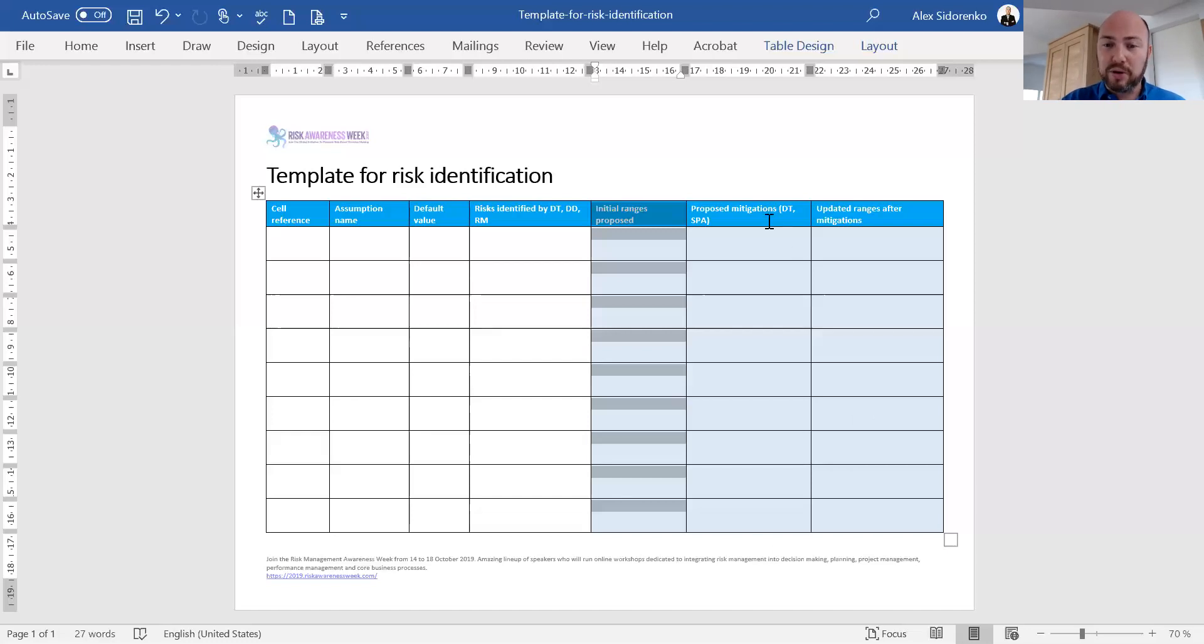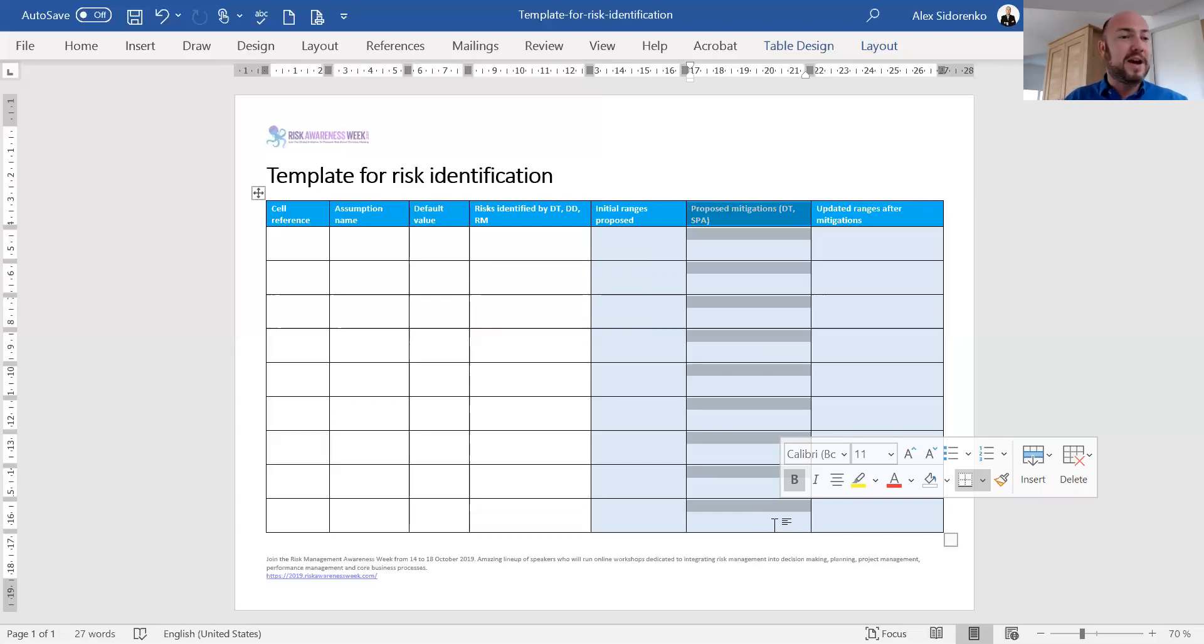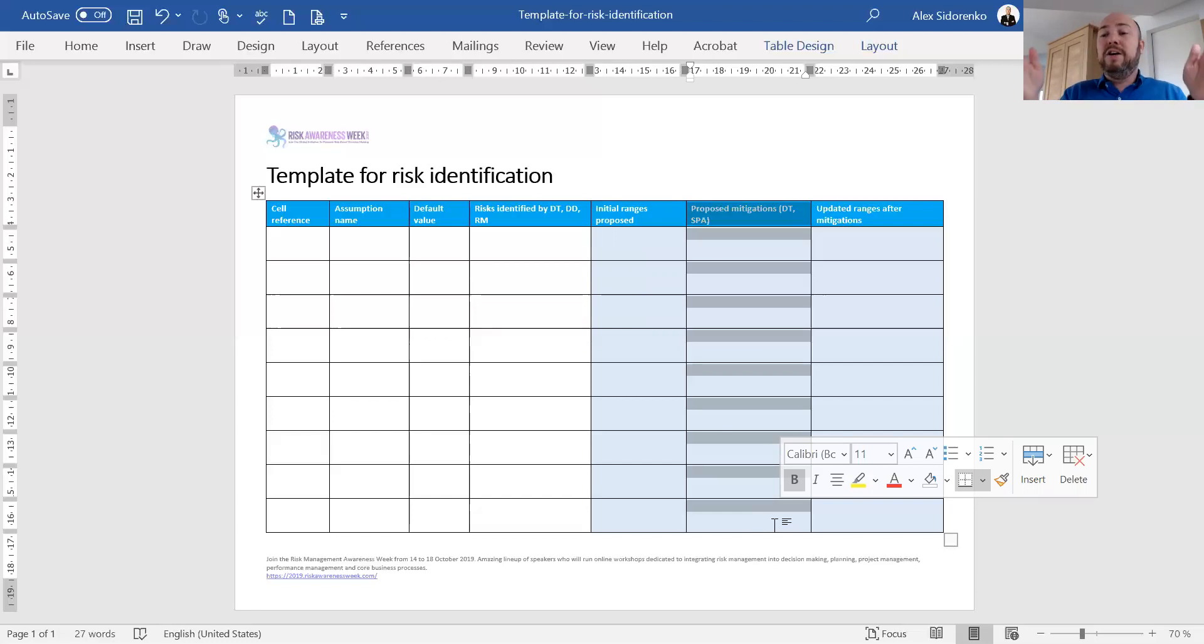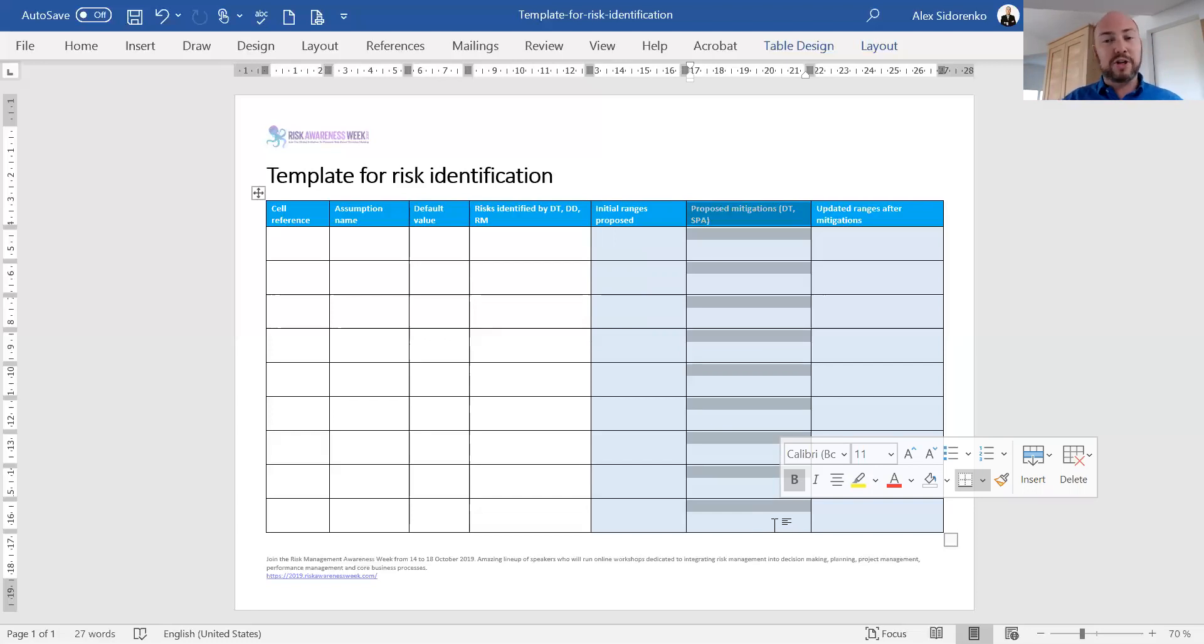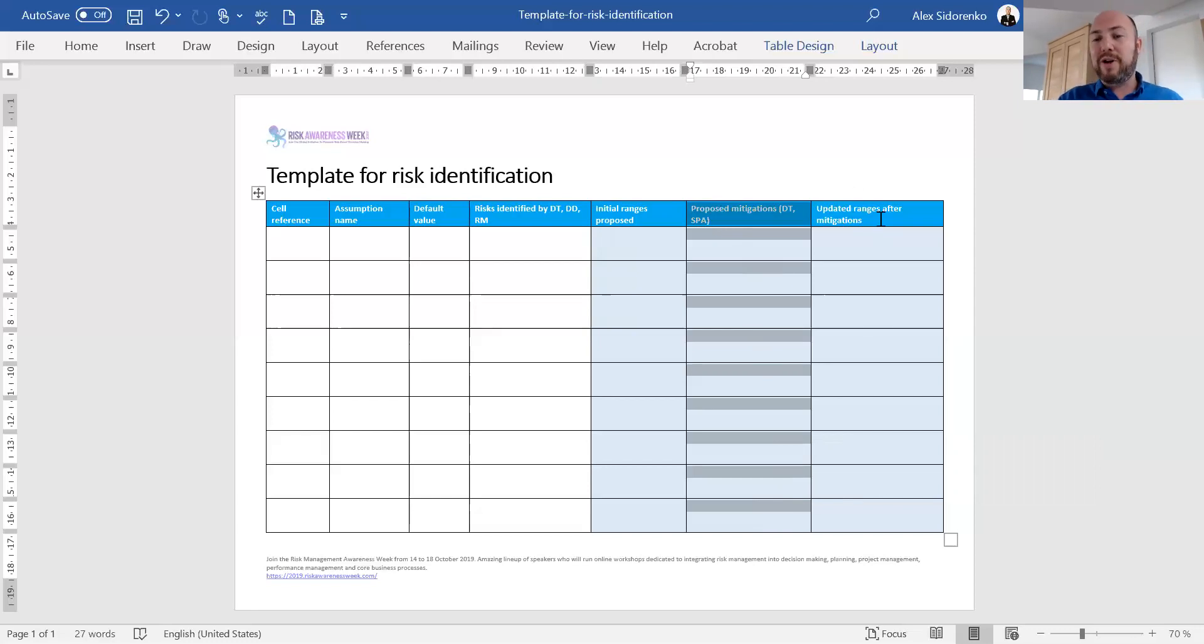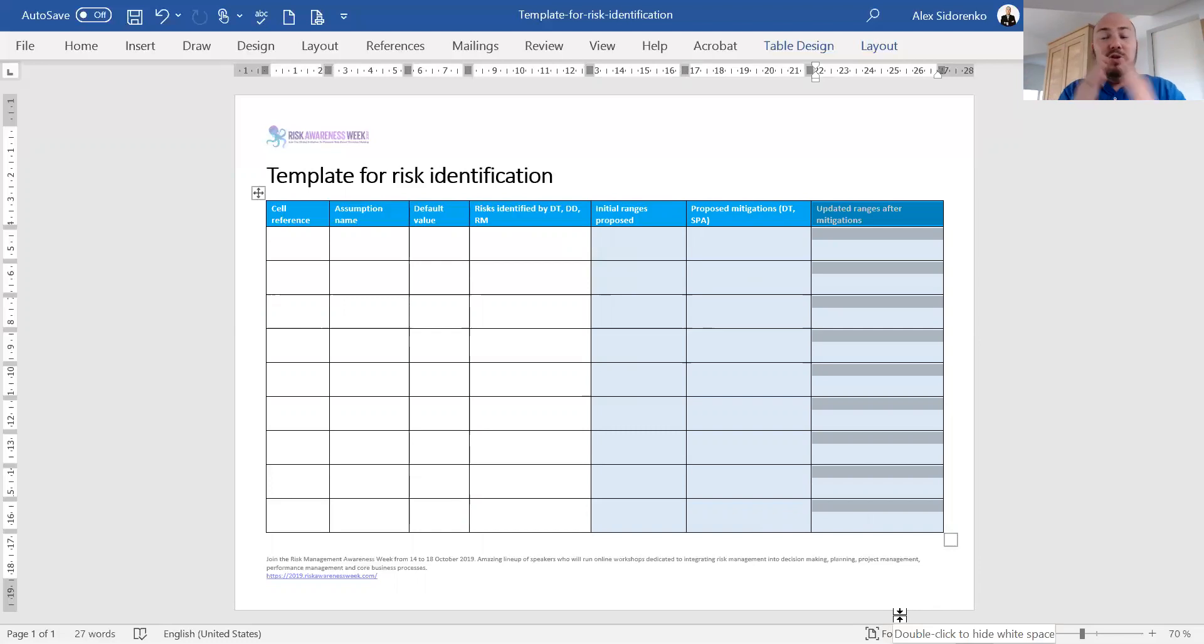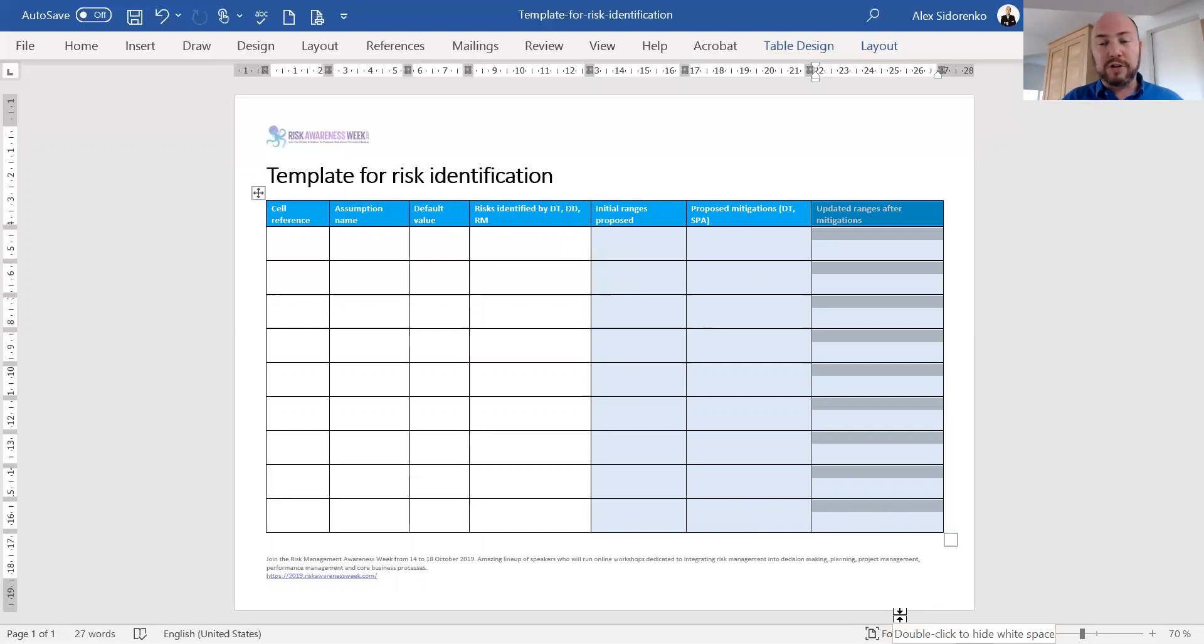The next column is very important. We now have another dialogue with the decision makers and key stakeholders, trying to identify what are the proposed mitigations, what are some of the mitigations they are considering as part of making this decision. What do they have in mind to mitigate the risks and reduce the uncertainty, reduce the ranges? That's essentially what we're trying to do during risk analysis. We're trying to seek additional information, take steps to reduce uncertainty associated with the decision. We may come to a conclusion that we have no information on a particular risk and may have to exclude it, but have to be very transparent about what we're excluding.